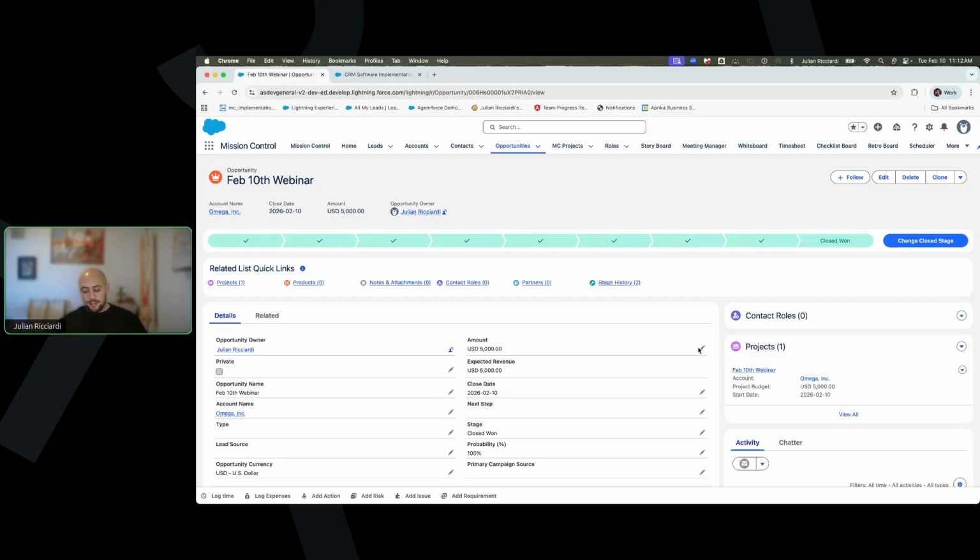These templates are essentially any project you develop or create in Mission Control. If you go into the edit field, which is super easy to do, and click the little template box, the project gets put into the template bank. So it's a very iterative process. If you are always leveraging the same template over and over, then one day you go off the beaten path and you deliver a more efficient project, you are able to go into the edit field, turn that newer project into a template, and then have that be your source of truth moving forward.